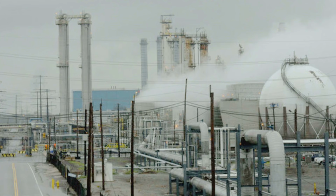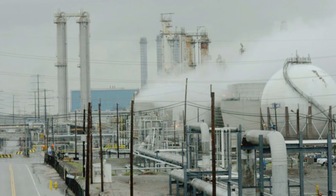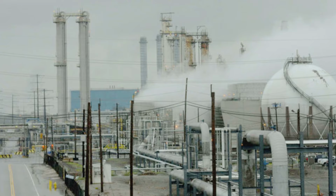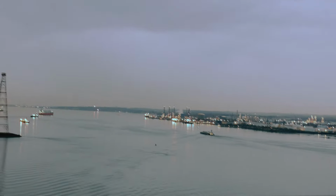To complicate things even further, we have to coordinate with Pico Energy on line outages during our construction due to clearance issues, as well as for final electrical tie-in. Through the hard work of the project management team with Riggs Distler, we'll have this project complete by March 2015.